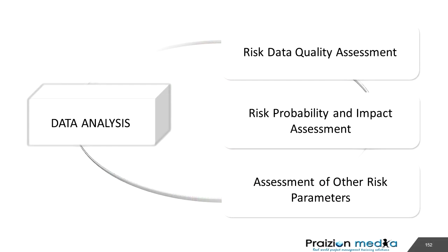The project manager and the team need to start from ground zero, collecting the data all over again, or start from the point at which the data started becoming corrupt. So that's our main goal, to make sure within this risk data quality assessment that the data is realistic, complete, objective, relevant, and timely.